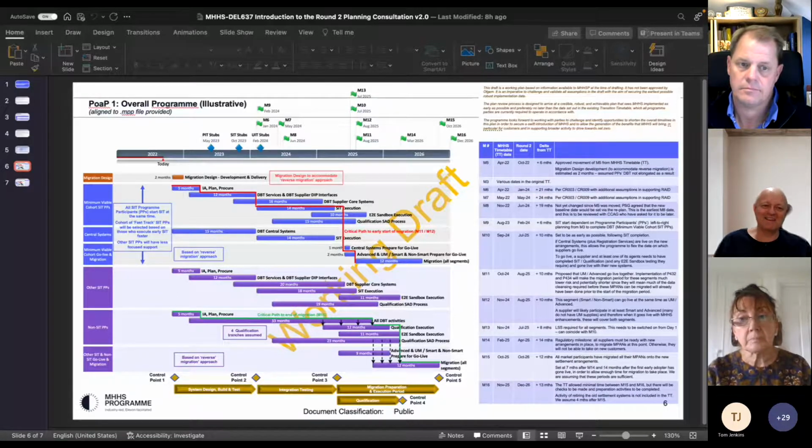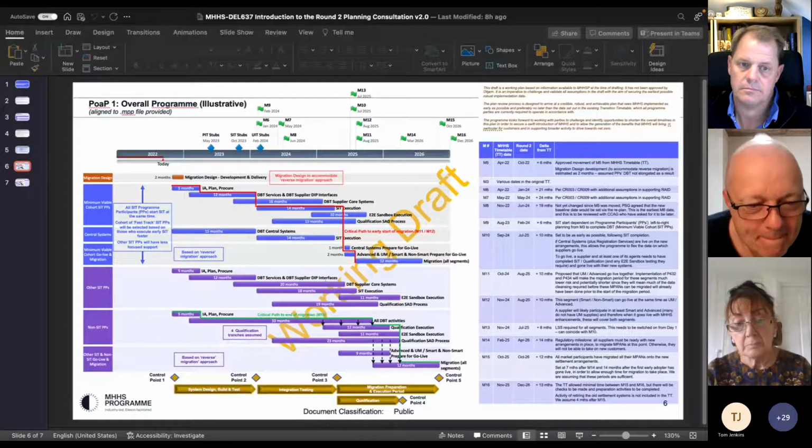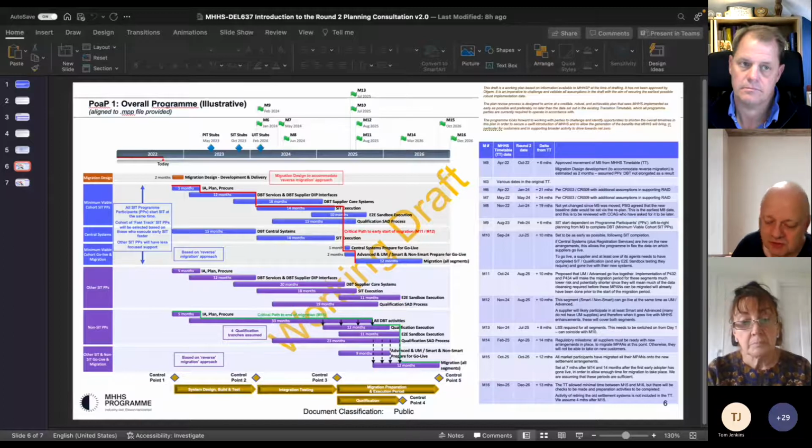Yeah, absolutely. What I'm saying is ultimately, especially because you've said that if we're not certain at round 3, we'll keep going for a bit until we are certain, there comes a point where you do have to say, right, this is it. Yeah, and there'll be things we won't be certain about at that stage, but we need to be comfortable with that situation and the risk that it represents, because there's an element of more risk about not having a baseline plan that we're working to.